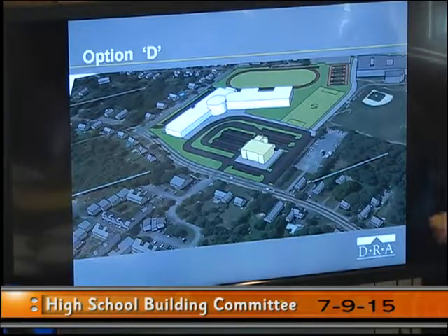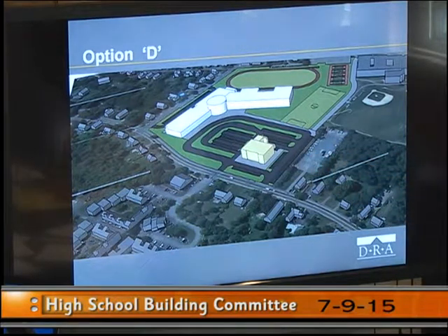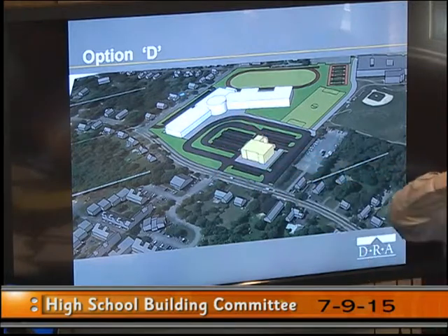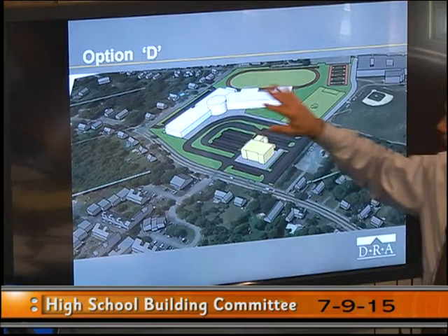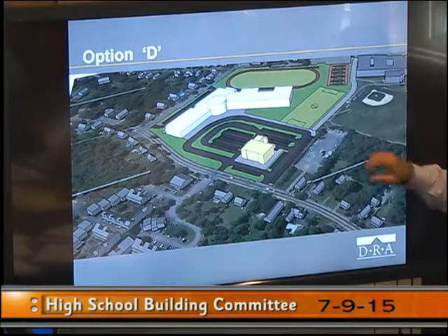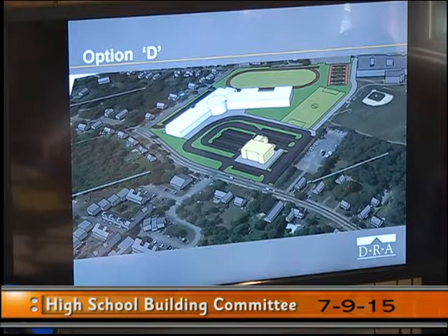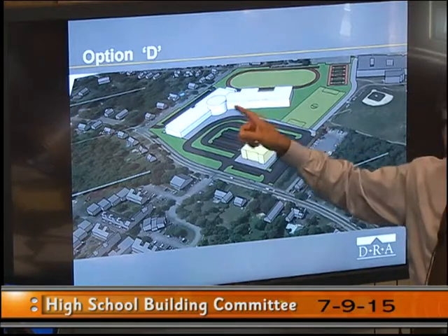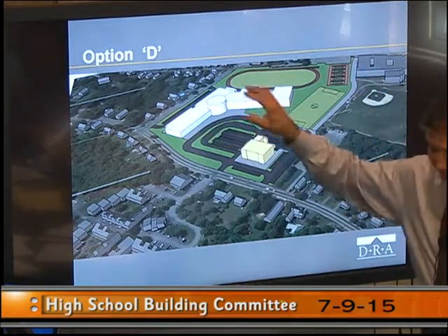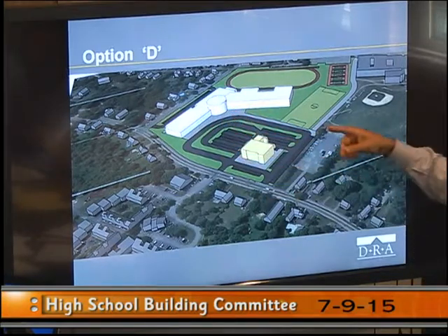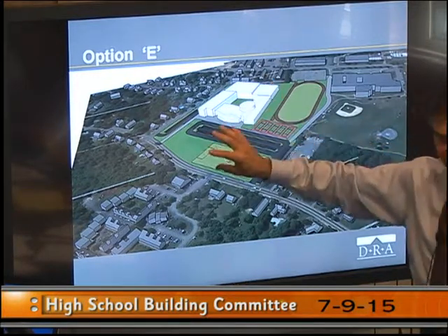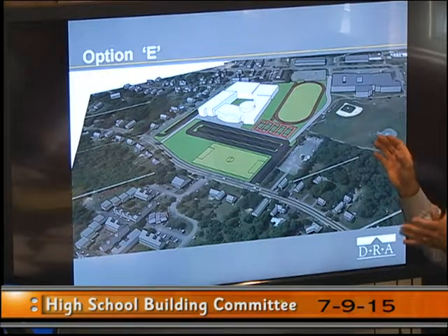Yes. And again, the thing we'd want to clarify with MSBA, this is one of the things we'll talk about at the kickoff meeting, is when we say there's a number of options for new construction, to our minds as designers, it means we have an educational program. That program can be configured in a few different ways. The building might take a certain shape, might be a certain number of floors, but also the options are where is the building located on the site too. And in some cases where the site is fairly limited, you can't take this kind of a shape and put it anywhere on the site. That solution for the building is also specific to that part of the site. And if we go to the next one, if we have a courtyard building, it can't go anywhere on the site necessarily either, because it has certain dimensions and certain access points.